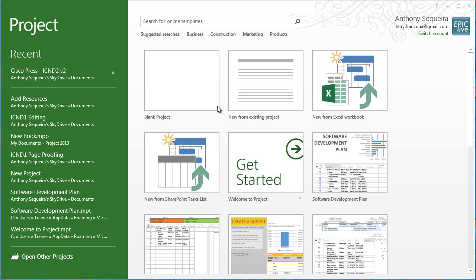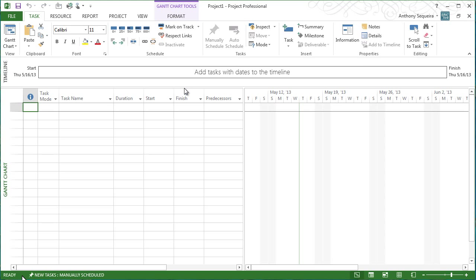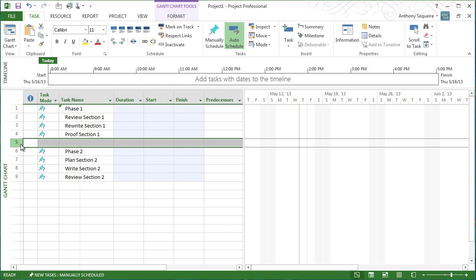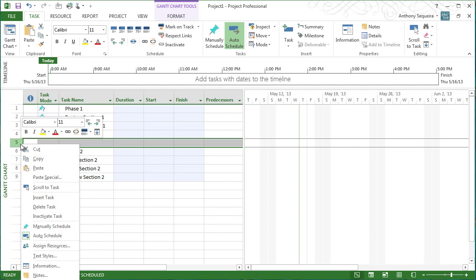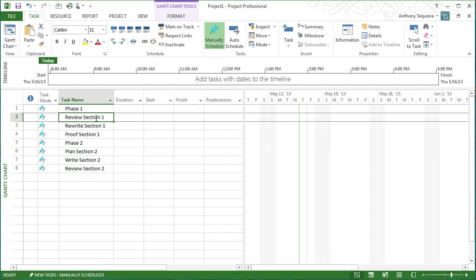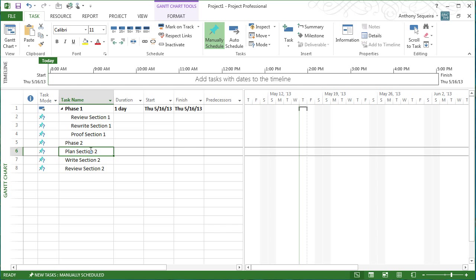So here we are in Project. I'm going to go ahead and open a new blank project. I'm going to click in my first task name, and I'm going to hit Control-V on the keyboard, and I'm going to paste all that information in from the email. I've got an extra task row here due to the carriage return in the email. I'll delete that task. And now notice that these are all tasks that have to do with phase one. I'll go ahead and indent them, and they become subtasks under phase one. How cool.